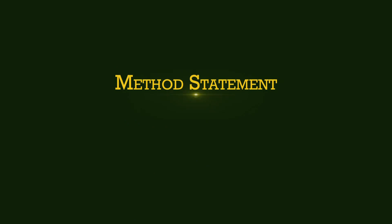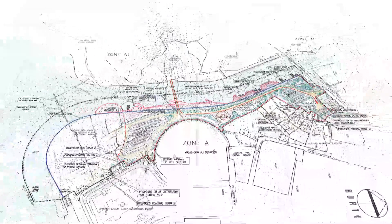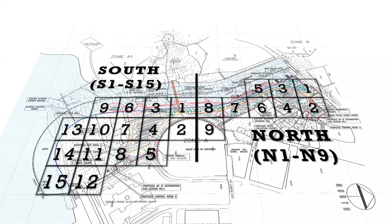The project area is divided into two main areas, North and South, which are further subdivided into 9 and 15 areas respectively.